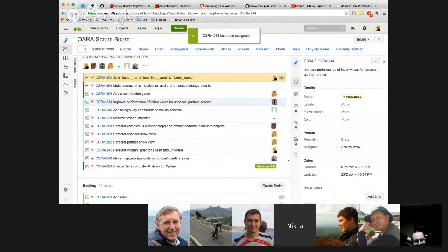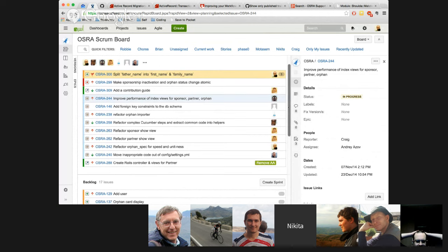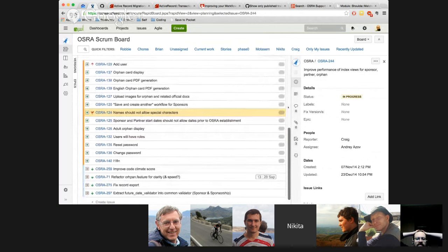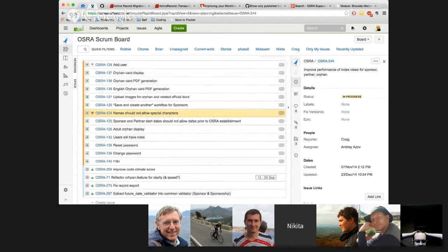Okay, so let's everybody think about, first of all, your current commitments in terms of the tasks and features that you're working on, and second of all, how much free time you will have for the next 2-week sprint. And then let's look at the backlog, and if anybody has interest and time to take on another task, then let's put it into the sprint as well.